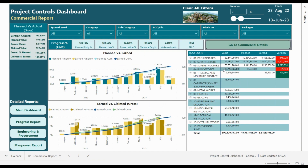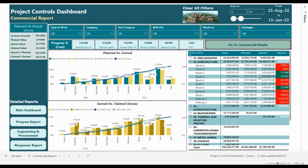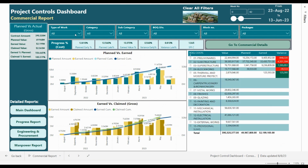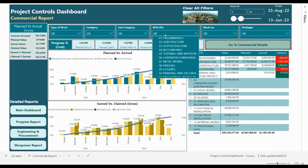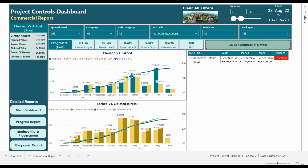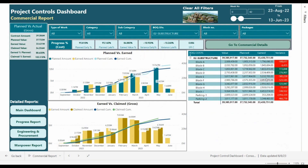On the right side this is analysis based on the BOQ divisions — for example the BOQ is divided into substructure. We can see the variance in the substructure; by expanding the division we can see Block A has a minor variance, Block C and Block D are okay but ahead of planned cash flow, and parking will also be analyzed. You can filter by type of work, categories, subcategories, and BOQ divisions — for example selecting only the substructure work shows the trend and the analysis of the claimed versus earned amount.